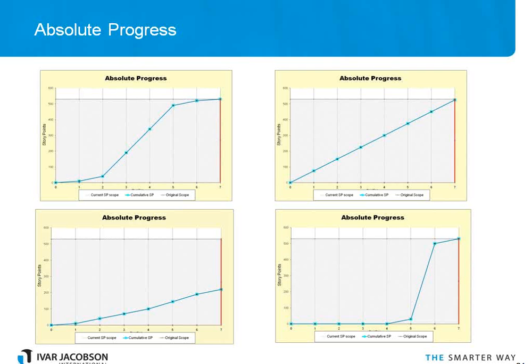This would be, well, again, this is when they're not doing any testing until the end, because until it's tested and verified, we can't score any of our story points as done. So always looking for things that are done. If we had our progress chart, like one of the top two, and no defects, remember the escape defects, one along the bottom, that would be fabulous because all of the software is defect free.